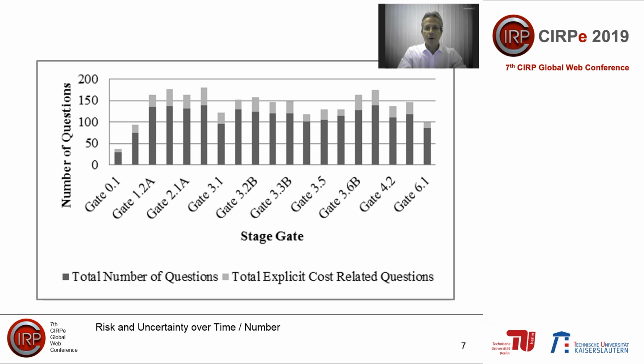Please remember, every risk question results in assumptions and risks and then uncertainties. A risk may or may not be closed between stage gates. The stage gate model thus suggests that uncertainty may not decrease over time, since it continuously is re-injected at every stage gate. Let us now examine how we assess the magnitude of these risks versus only counting them.